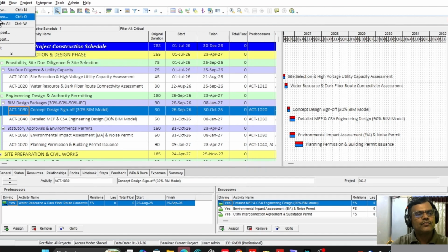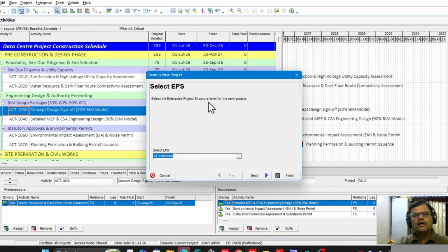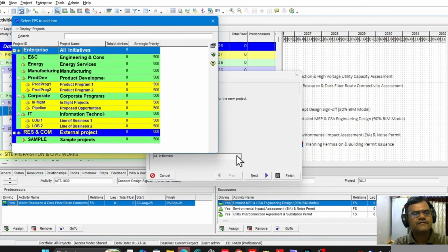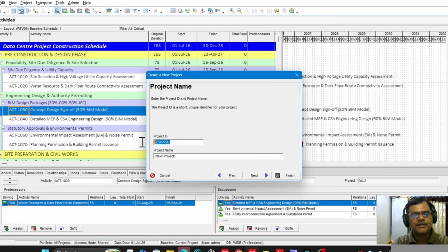the new project. So I'm going to tell you the entire thing here. This is the EPS, or you can select wherever you want, for example in the sample project. You have to select the EPS first. Then next, you have to give the project ID. You can say 21 RES or whatever you want.